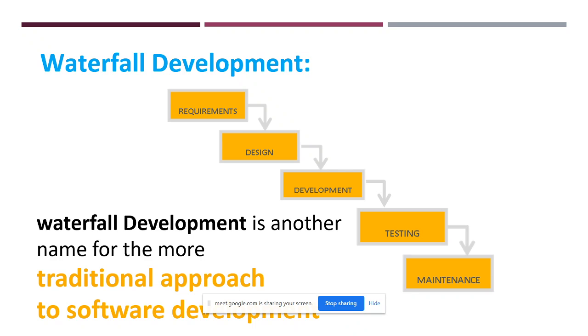The business analyst will contact the business users or clients and do the requirement gathering, right? They will collect what exactly the clients want and how the product should be built. It's a phase by phase manner, as they say, waterfall. If it's a big product, project or application, it will take a lot of time to gather the requirements, maybe one to two or two to three months. In this phase, we collect all those requirements from business or clients.